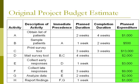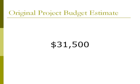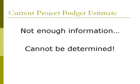The original project budget is the sum of the costs listed in the final column of the table, highlighted in green. This sum comes to $31,500 for the original estimated project budget. The current budget estimate cannot be determined with the information provided in the problem; to calculate this, we would need information on how much money has been spent thus far on the project.